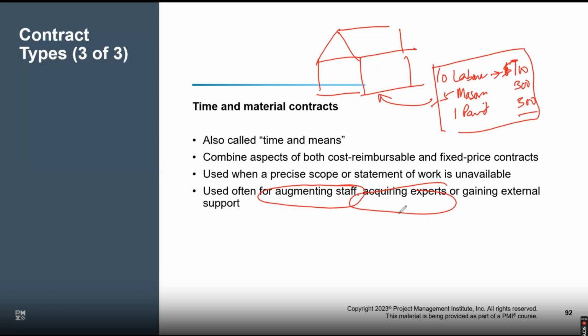And you say, okay, you need people, I'll provide you people. You tell me how many people you need, and I will provide you. This is what I pay to them. It's none of your business. The bottom line, you tell me what you want, and I'll provide you. This is my rate card, and you can look at it and decide what you want. I'll supply those people. They will be working on your site and doing the job, and you don't have to pay them. You have to pay me as per the rate card. What I pay to them is none of your business. I may be paying them nothing. That's none of your business. The contract is between me and you.